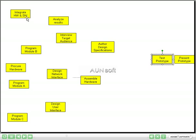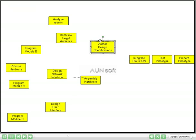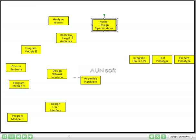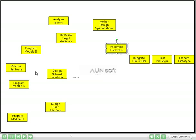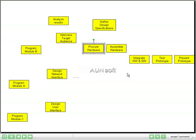Before we can test the prototype, we need to integrate the hardware and software. Now using the hardware side, before we can integrate hardware and software, we must have assembled the hardware. Before we could assemble the hardware, we had to procure it. Moving back to the software side, we would have had to have done the programming.